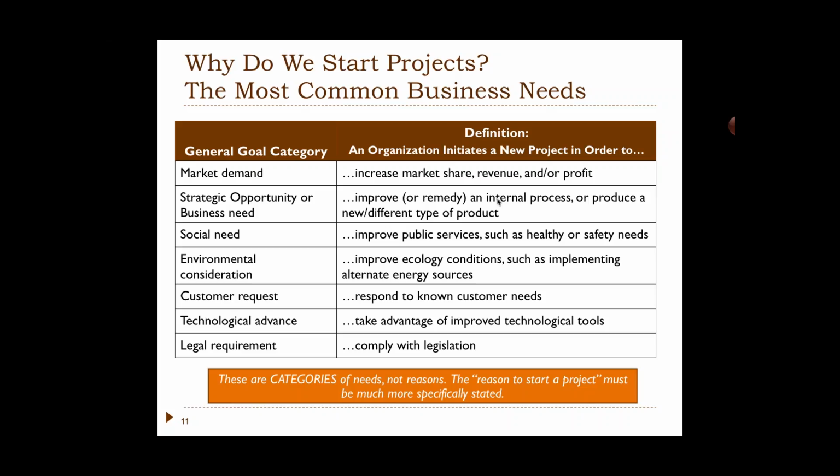On the other hand, if you do know why we're doing this, if you can tie it into the strategic plan of the organization, when they come to you and say, Kathy, we're cutting your project funding by $100,000, or we're taking away a key resource from you, then Kathy can legitimately come back and say, wait a second, this project is strategically important. We said that this project is going to move us forward in these ways. What changed?